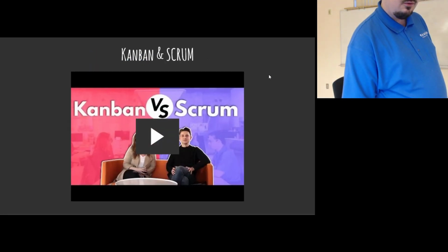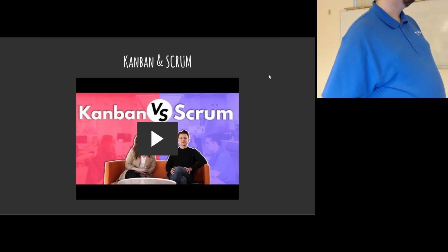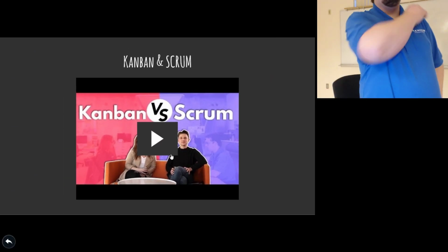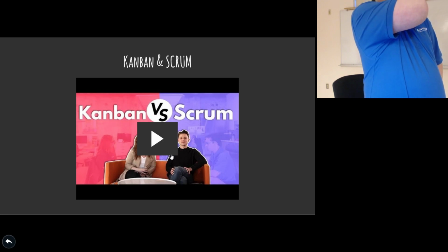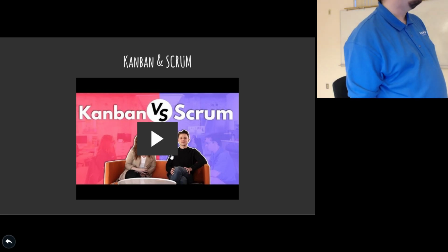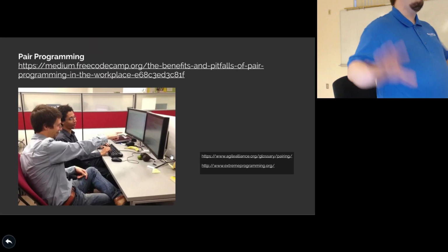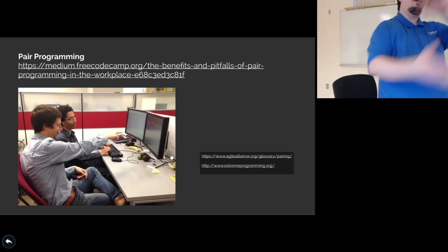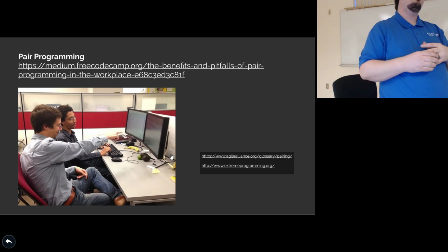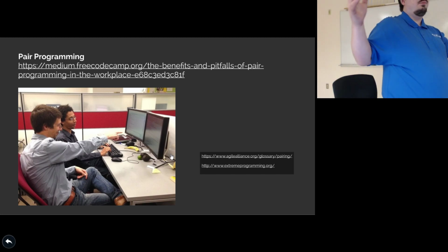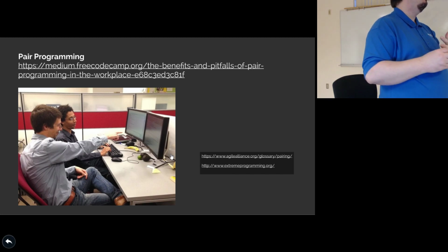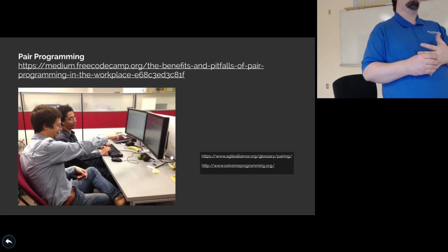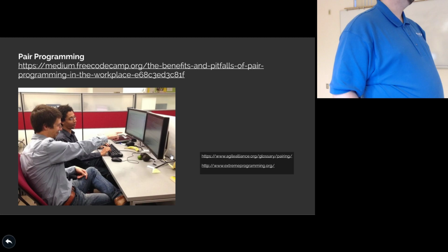So that's Kanban Boards. There is a video here, which is worth watching. I'm not going to play it here. You can watch it on your own time. It talks about Kanban versus Scrum and how those fit together. And again, people usually end up doing a hybrid of both. The main difference between formal Kanban by itself versus Scrum by itself is that Kanban by itself does not have sprints, a strict beginning and an end. But that rhythm is often helpful in working with software.